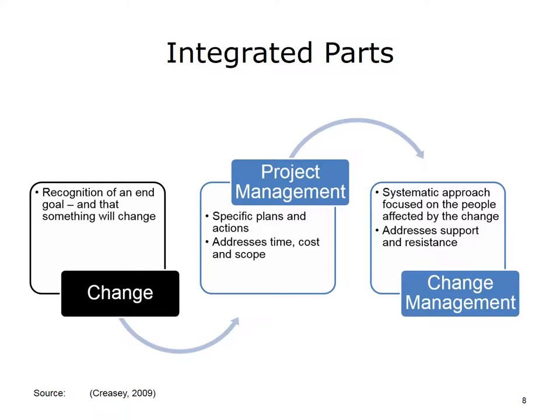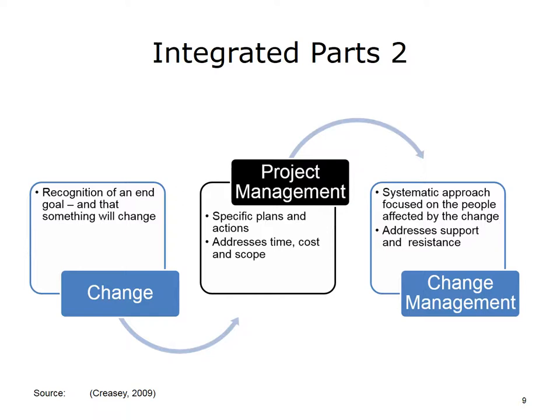Another example might be a clinical decision support program which alerts physicians to drug interactions while they are prescribing — a program designed to reduce medication errors. Second, we have project management, which is centered on balancing time, cost, and scope constraints to utilize resources effectively. CRESE calls the specific plans and actions needed for project management managing the technical side of the change. In the example of the clinical decision support system, the goal of project management might be to develop a plan for getting the necessary hardware and software installed, the drug interaction rules designed, the system tested to make sure it works properly, and the plan for where, in what sequence, and on what timeline it will go live.